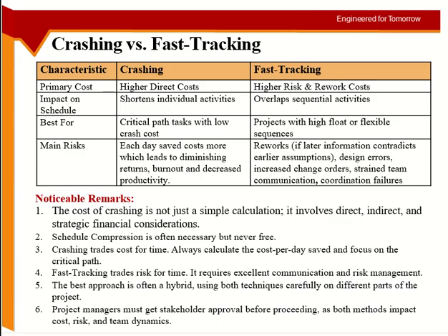Okay, and the thing is some recall of what we have already done, what we already said earlier. When you are crashing, you are trading cost for time. So I'll pay extra to save time. Okay, and you have to do it on the critical path, and you have to look at the per day extra cost you are having. Okay, and in fast tracking, like I mentioned, your main challenge is how you manage the risk and how you will communicate with your team.